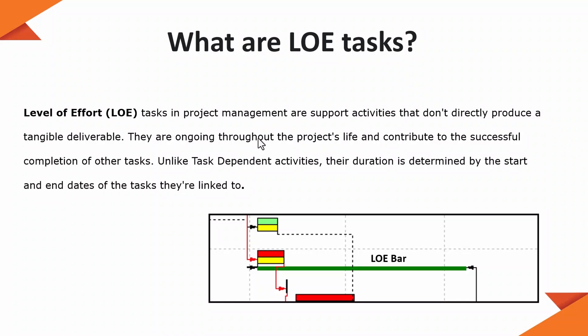Unlike task-dependent activities, the duration of level of effort tasks is determined by the start and end of the tasks they are linked to. The first activity driving the level of effort will be linked with a start-to-start relationship, and the last activity will be linked to the level of effort with a finish-to-finish relationship. So if the activity driving the start of the level of effort is delayed, the level of effort will reflect that as well.